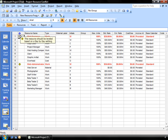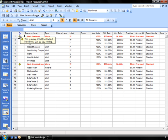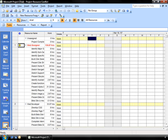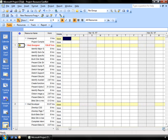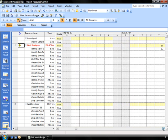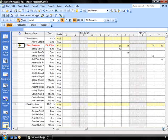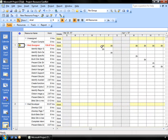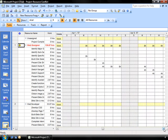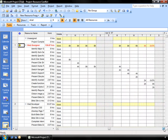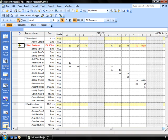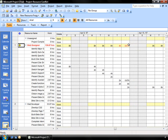I've also got an indicator on my indicator column here that shows me that I have a problem and gives me a suggestion on what I should do about it. Another way I can look at this information is by using my resource usage sheet. And this is kind of a combination of both views. It lets me see the tasks for that particular resource. And as I scroll through my chart, I can see the days and the hours that I have people working at different tasks. And again, as I scroll through the sheet, everything's good until I come up with my red indicators here where I know there is where I need to make some adjustments.